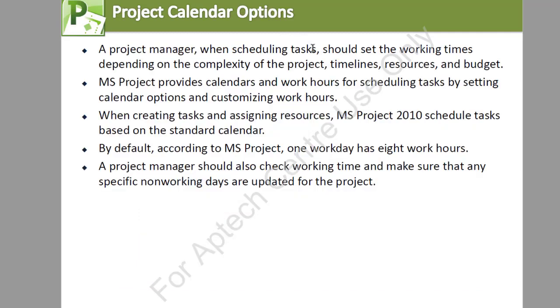Now, project calendar options. A project manager when scheduling tasks should set working times depending on the complexity of the project, timelines, resources, and budget. MS Project provides calendars and work hours for scheduling tasks by setting calendar options and customizing work hours. When creating tasks and assigning resources, MS Project 2010 schedules tasks based on the standard calendar. And by default, according to MS Project, one workday has 8 hours.